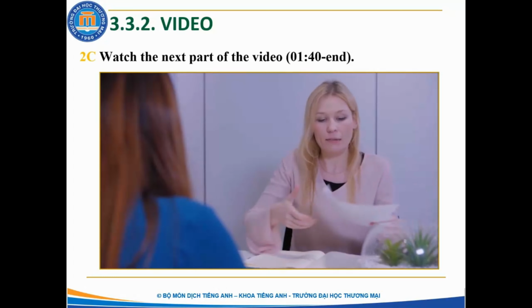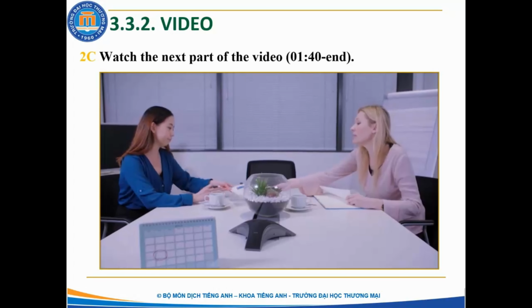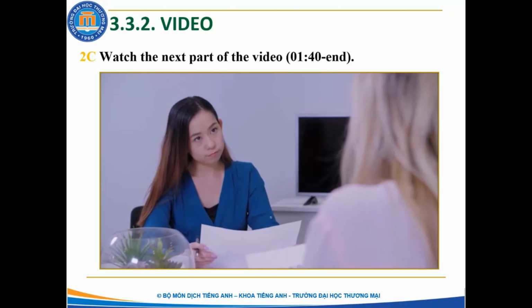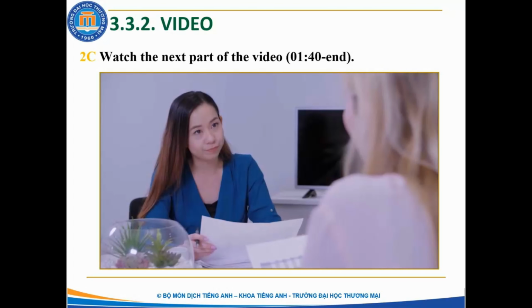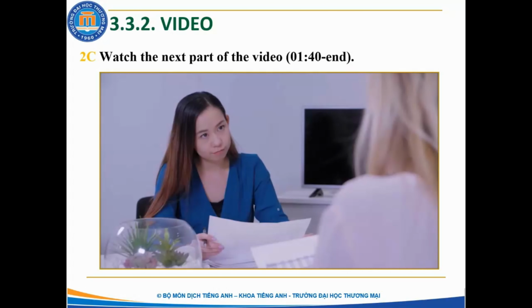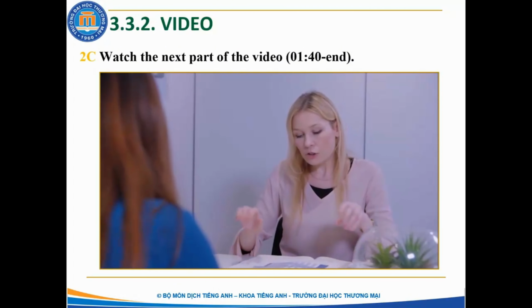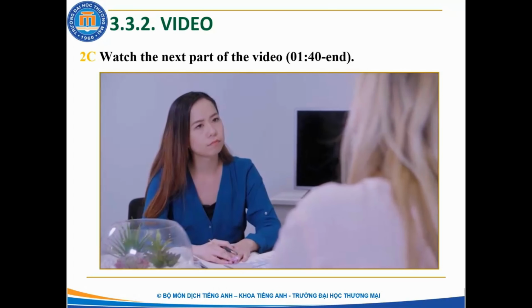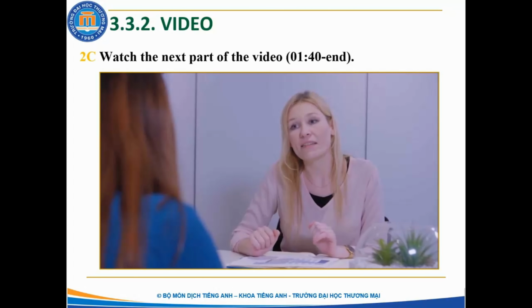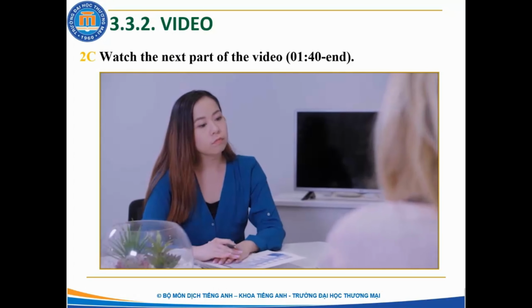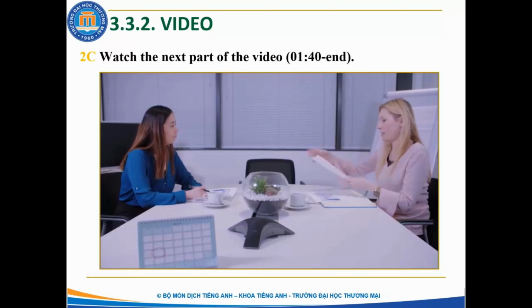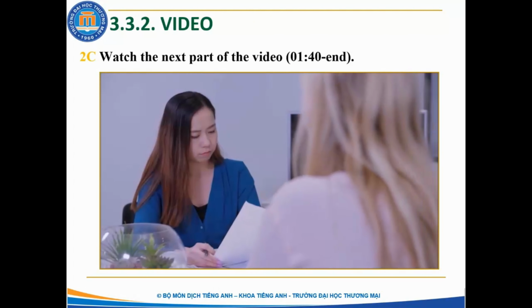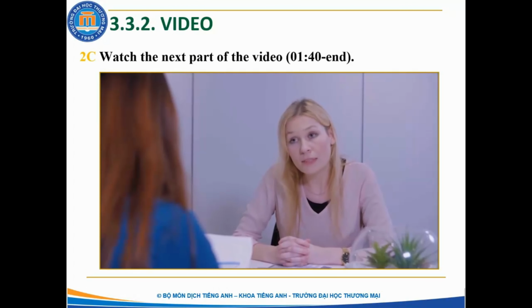Here we are. April 17th. That's when the delivery is supposed to leave your factory, isn't it? Yes, 4 weeks from now. And the container will arrive on the 28th of May? That's the plan. The trouble is that one of our deadlines has been moved forward, so we need at least some of the components by 10th of May. I should have the details here. Yes, these ones. The new schedule would mean we need at least one shipment early, probably by air.